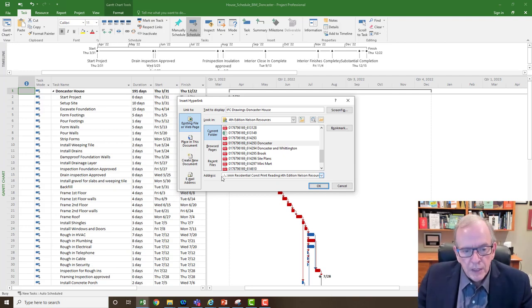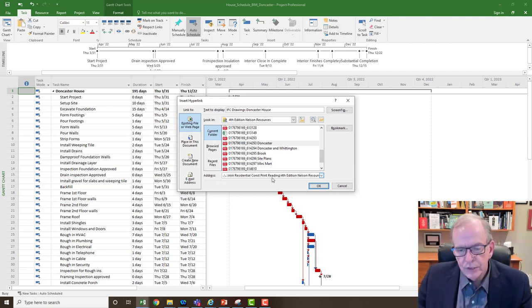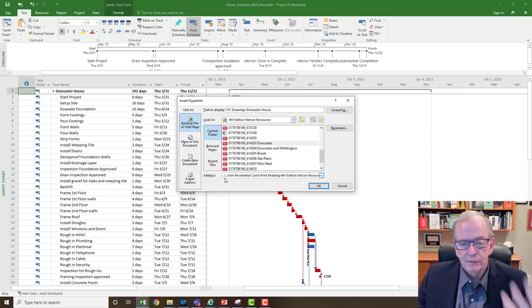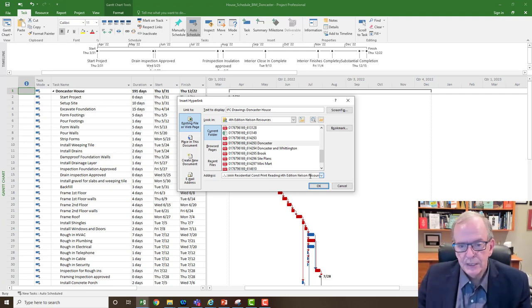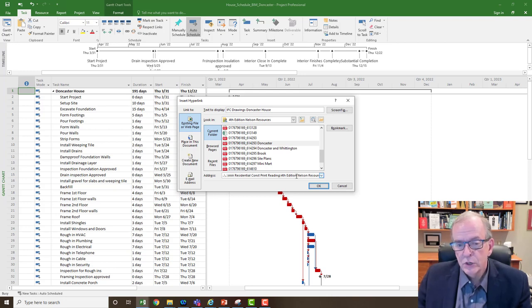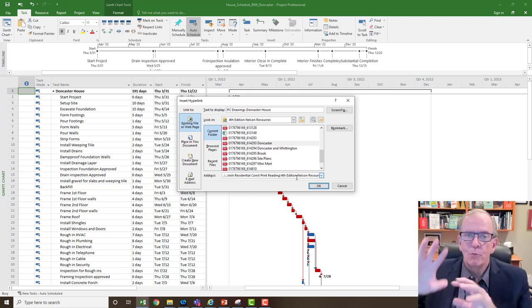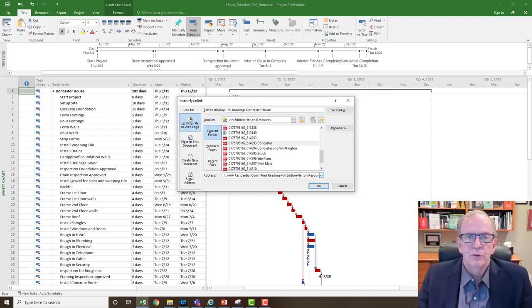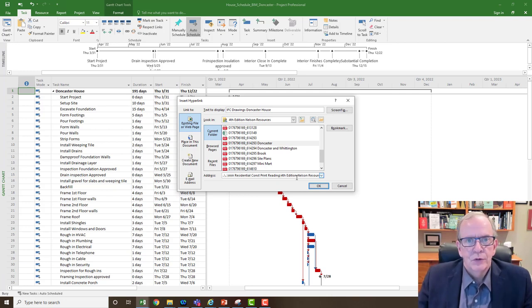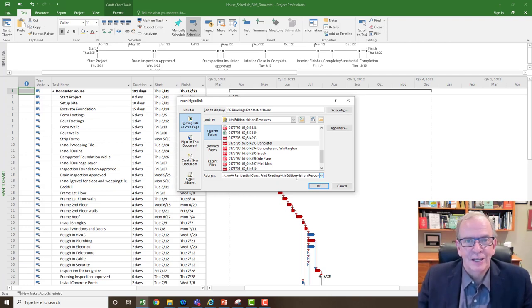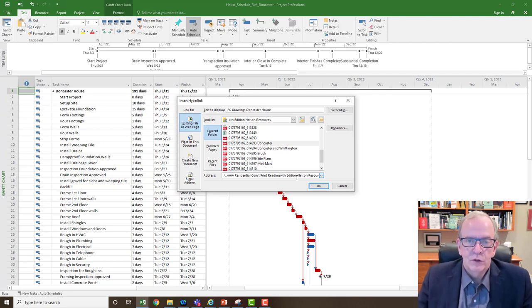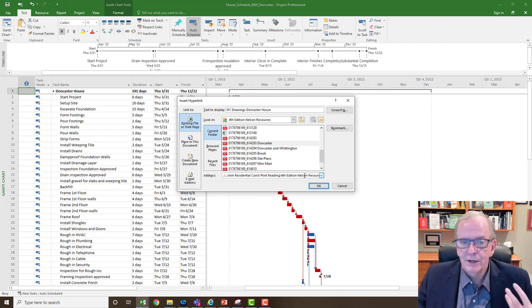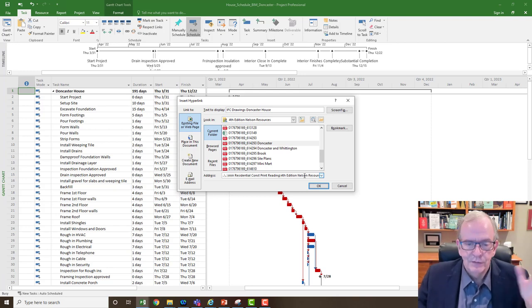So the address, which is where it's housed on your computer or in the cloud, will be listed down here. This works as long as you don't move the files around. If you move your files out of those folders, then it'll just say it's a broken link. You have to just redo it if that's the case. But if you're leaving your files where they are and you've got them organized fairly well, you click OK.